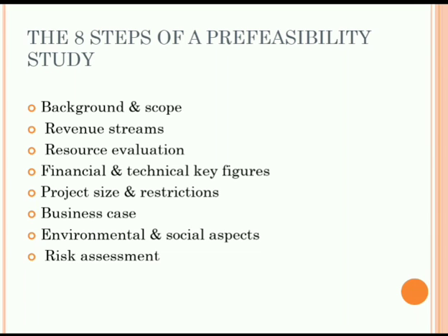In the pre-feasibility study, we have to check background and scope of the project, revenue streams, resource evaluation, financial and technical key figures, project size and restrictions, business case, environmental and social aspects, and risk assessment. All these steps we have to go through for a project. Means we have to go step by step for a project. In a pre-feasibility study, we have to consider all these 8 steps, and we have to answer all the questions regarding these 8 steps. Now let us see in detail each and every step.